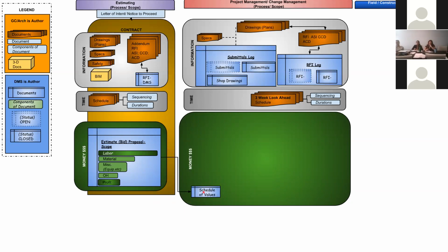And that's a very critical component in dealing with money, because it leads to the billing process. Whatever we say our values are, and they approve it, and that can go through 2 or 3 rounds. Oh, we like this, lower this, bring this up, this doesn't make sense, please clarify that. Creating the schedule of values, getting that finally approved, once that's set, it will lead into the billing process, that every month that we then ask for money, we put in an invoice or a pay application.